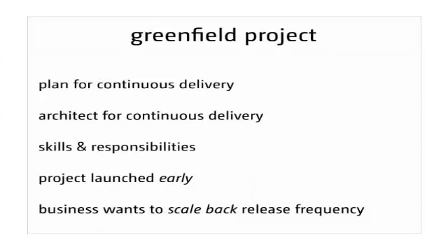It wasn't just talking about requirements, they talked about how are we going to build our automated tests, how are we going to build our deployment pipeline, and they came up with real stories for those. And they actually worked out it was going to be a fair amount of work. They ended up dedicating one of their 4 development pairs to working on the deployment pipeline and automating the environment provisioning, and that made a huge difference to their ability to actually deliver functionality that would be known to work in a production-like environment.